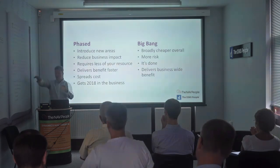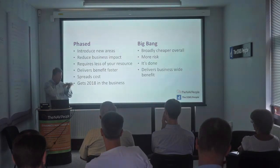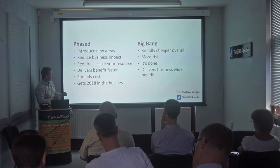We've moved, the new system is doing finance, lots of other stuff, but they had a very complicated telesales system in the old system. So we're simply doing an interface. They carry on putting the orders into the old system, and we squirt them across into the new system, and they look like orders that have been keyed in there. Okay. So there's lots of ways of considering that phasing. It's very business specific. So it's a conversation we want to have with you.